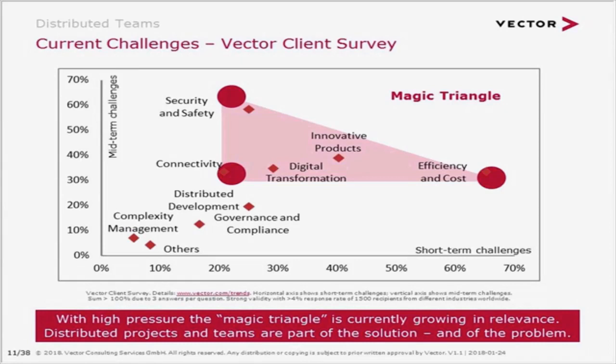Those who would still go only for cost reasons in distribution are typically not well advised because there are a lot of such hidden costs with respect to frictions, with respect to communication, with respect to a huge additional amount of process governance, etc. And these costs can be reduced. And if you talk here about a 30% with 2 or 3 sites, it means also that if we can cut out of this 30% overhead some 5 to 10 percentage points, then we have achieved already a big benefit. And this is what I put together in this webinar.